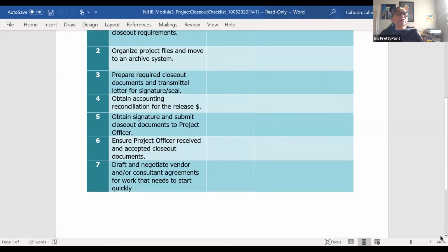And the final step we have here for you to consider is to work with the vendors that you have in your project work, and any consultants that you engage, and that you track their work right along with everything that you do: any of their contracts that you negotiated, the signed contract, the invoicing of the work that you gave them by deliverable, and then reconciling that, making sure they receive their payment, and always getting documentation that things followed through and were able to get to the end.